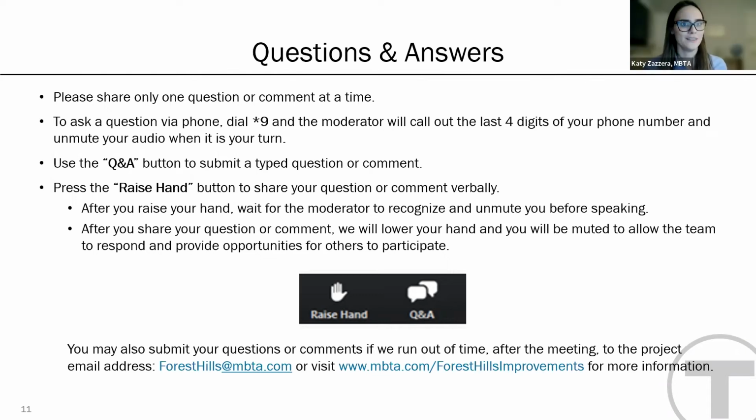Right. I do see a new written comment. Michael Reiskin says the community outreach for the 25% design has been so poor, I think we need to have another public meeting at 40 or 50% design. Thank you for your comment, Michael. This is the 30%, and we do plan on coming back when we hit our next key milestone, which is the 75% design. So we will be holding a public meeting at 75%.